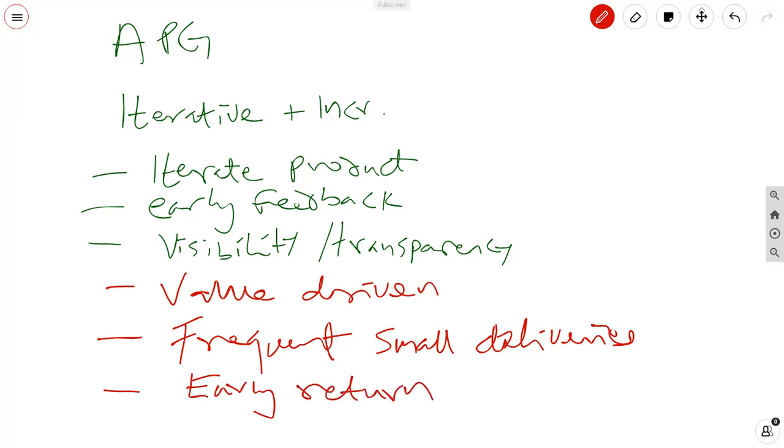This is why we talk about things such as the cost of delay in projects that are of an agile nature, because we know that delaying the value could end up being bad for the customer. So we want to deliver as soon as possible, and we want to count the cost of delivering later than we would have normally. It says, because the team can release earlier, the project may provide an earlier return on investment because the team delivers the highest value work first. That's another hallmark of Agile, is delivering the valuable stuff as soon as you possibly can.